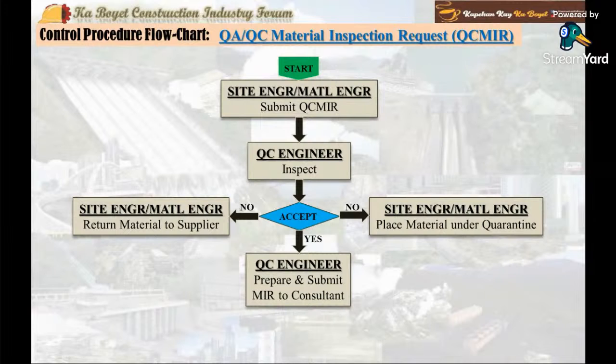And lastly, the material engineer or the site engineer, warehouseman shall notify the QC engineer of the exact location of all quarantine materials or equipment. And this QCMIR process ends.